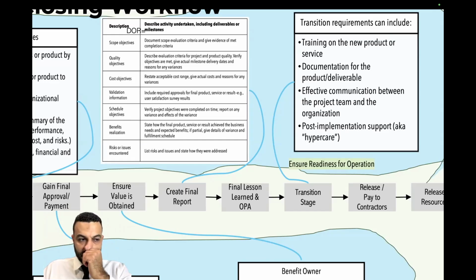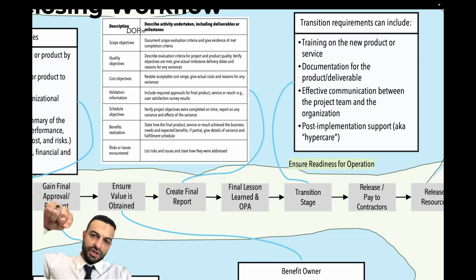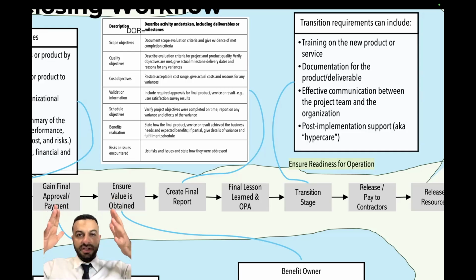In the waterfall, you should also have the same report, an Excel sheet simply. You write the topic, the lesson learned, and the impact. So, for example, this is the topic, and here the lesson learned: when we submitted the document to the customer, we didn't make a proper internal check. The impact: the approval was delayed. And maybe you can put suggestions or recommendations for the future. This sheet is very important for your life experience in project management and also for the company as well.